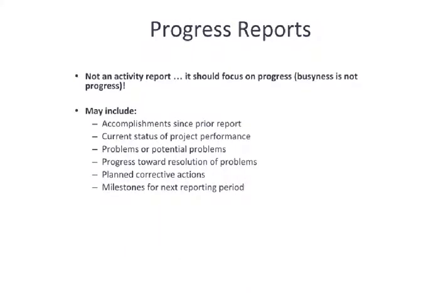Now, turning our attention a little to written materials, progress reports are likely going to be one of the key written documents that you will have during the life of a project. Project reports are critical in some fields. In my field of engineering, progress reports are absolutely critical. They're typically required on a very frequent basis. Weekly is very typical of a project team and each sub-portion of the team.